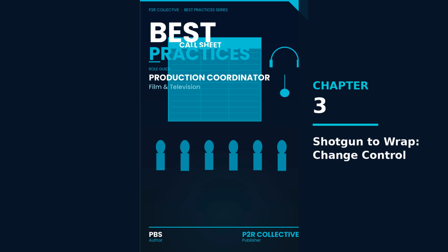Do not start VFX composite pickup at 5 o'clock. Materials Priya uses: a change log sheet with columns timestamp, trigger, change type, affected items, effective time, publish version, status rule; the schedule truth document; and a single publish message thread to AD, production, locations, and department leads. Run the change control loop.